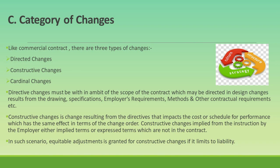Directed changes must be within the ambit of the scope of the contract. These changes may involve design modifications resulting from drawings, specifications, employer's requirements, methods, and other contractual requirements. They are typically issued by the engineer or employer's representative under the authority granted by FIDIC Clause 13, and any adjustments to the contract price or timeline must be negotiated and agreed upon. Constructive changes occur when directives impact the cost or schedule of performance, effectively altering the contract terms. These result from implied or expressed instructions by the employer that are not formally recognized as change orders but have the same effect, such as delays in providing access to the site or necessary information.